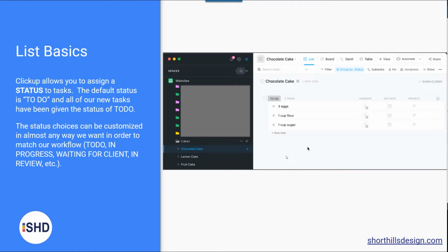In progress status, which means whoever was assigned it has now started it. So when I assign, let's say I assign you a task, I only know that you've looked at it when you clicked in progress, so that I know that you've at least acknowledged that and you've seen it. And it's in progress. And then we have waiting for client. I put that nice and big in red because I can't put stock images on if the client hasn't approved them yet. Then we have on hold, which I just keep as an open one.